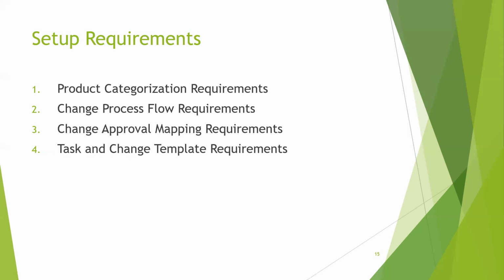And then the last thing is set up your task and your change templates because I need to have them choose those templates correctly. And you may not have to do that, but it does help if you have templates going on. If you're going to a change, and this is mainly for you, Matt and Kim, you may want to set up generic templates for normal standard change so they follow the process. So I prefer that they always create a template so they follow what your processes are. And that way you can guarantee a standard. It's going to have a change template anyway.